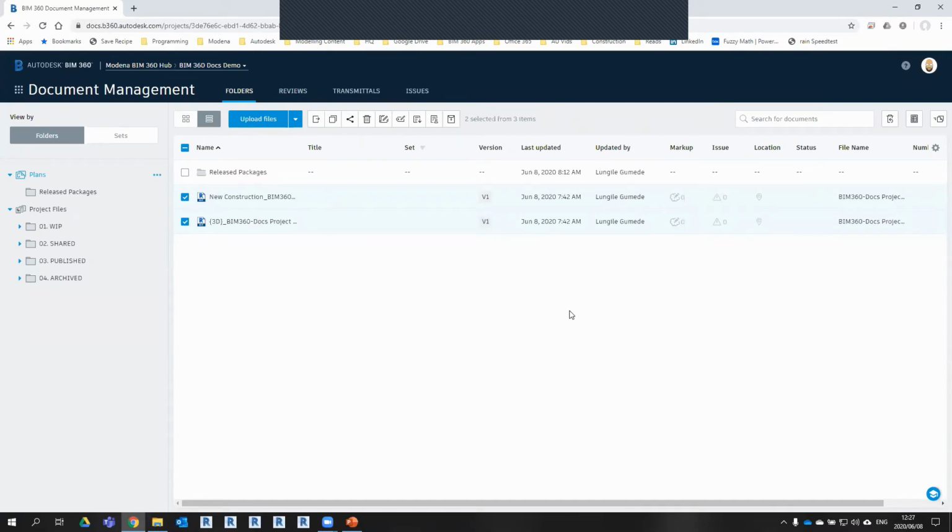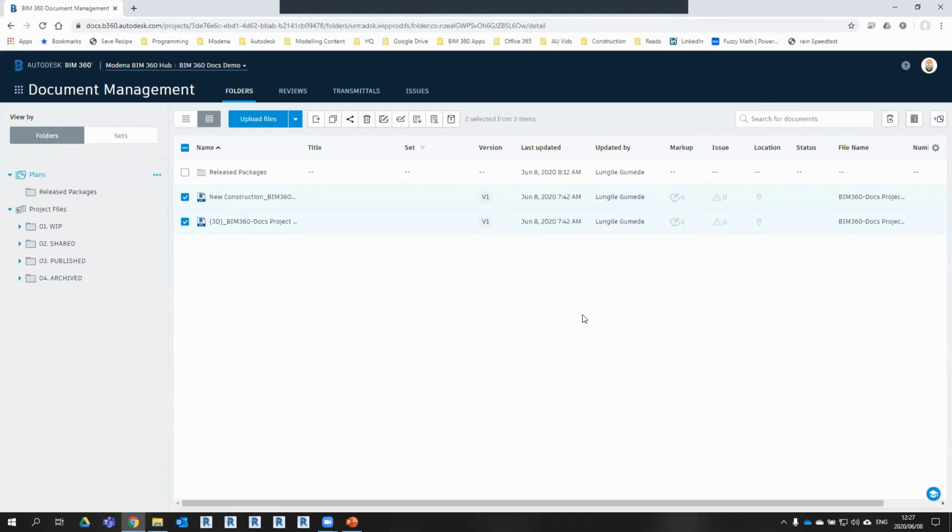Just a quick question: how does it work when one of the reviewers does not approve a drawing? When you submit multiple files, each file is reviewed independently. Although it's one approval process, if I've submitted 2 files, one can be approved, and one can be approved with comments, or rejected.